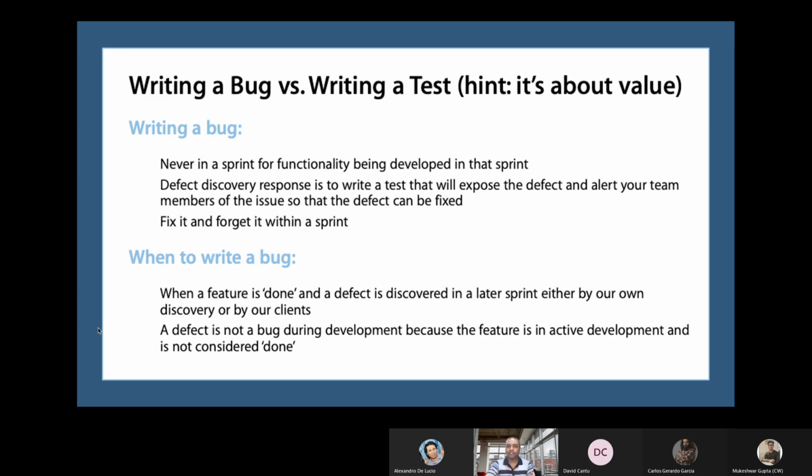So that person will fix it, so that defect is never raised. And then when it goes to, say, the staging or pre-prod environment, and if you don't have time, the sprint is almost about to complete and it's the last day of the sprint, then maybe at that time you may create some bug which may spill over, so the entire story is going to spill over.